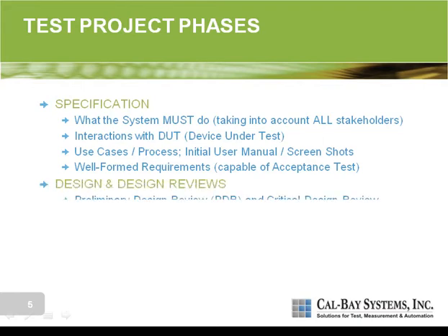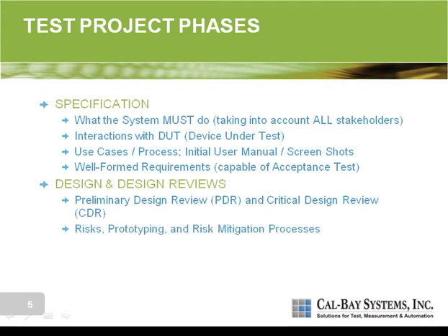The next phase in our test project is the design and the design reviews. After we've taken the specification, it's time to come up with a software architecture, a system architecture. What instrumentation are we going to use? What tools, like LabVIEW or TestStand, are we going to use? And come up with this design. What we like to do at CalBay is, from the kickoff meeting, have some amount of time to write that design and have a preliminary design review, or PDR.